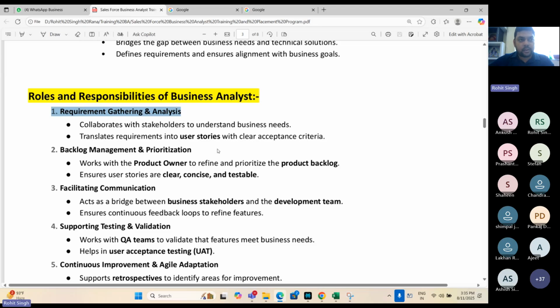Okay, and then traceable. Yes, you can trace it via a project management tool, via spreadsheets, Google Sheets, via Confluence, Jira, anything. Tracing means, I've created a plan. Day 1, 5 tickets. Day 2, 3 tickets. Day 3, 10 tickets. Day 4, 20 tickets. So these day 1, day 2, day 3, day 4, I have documented somewhere. That is the sprint plan, or let's say that is a project plan. So I am adhering to it. I am following it. So I am able to trace it.